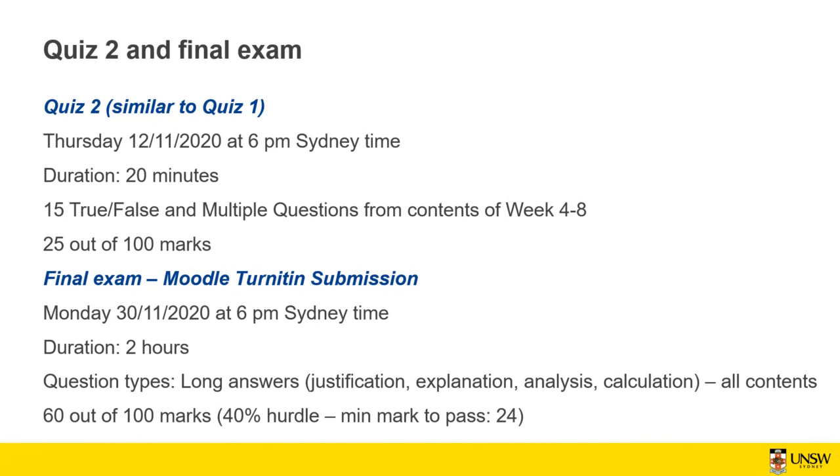Okay, thank you. Let's answer your question, Terry. Is EV equal to PV multiplied by percentage of completion? That's right. Or BAC multiplied by percentage of completion. It depends. First of all, EV is PV multiplied by percentage of completion.